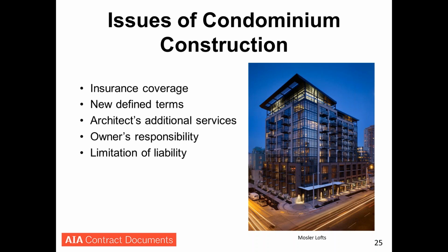And you say, well, why did you do a guide and not a contract? And the answer is because the risks presented by condominiums don't stem from the parties that are involved in the contract. Generally speaking, you don't get sued by the developer that you executed your owner-architect agreement with, and the builder doesn't get sued by the developer for some kind of breach or negligent activity. It's the homeowners that downstream move into these things and then discover, or have discovered for them by predatory law firms, defects or alleged defects in the design or construction, and they want you to pay for them.